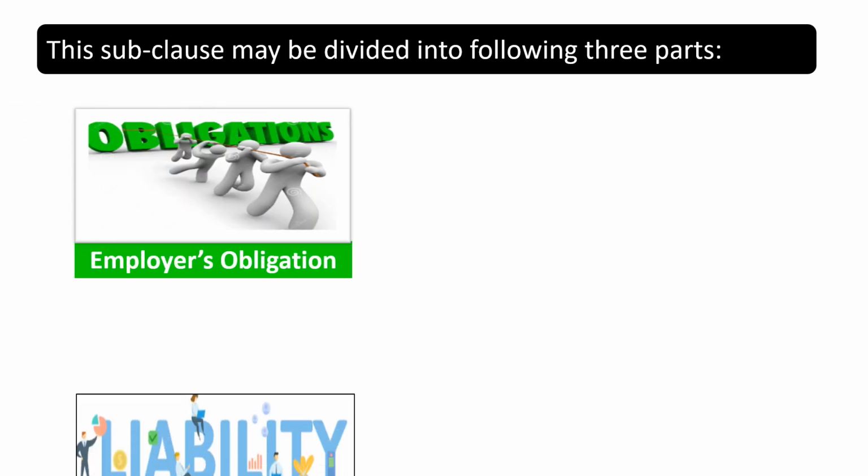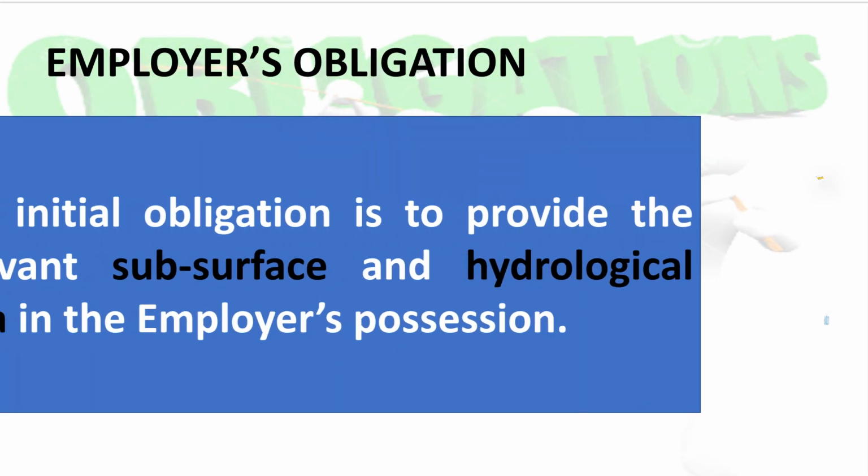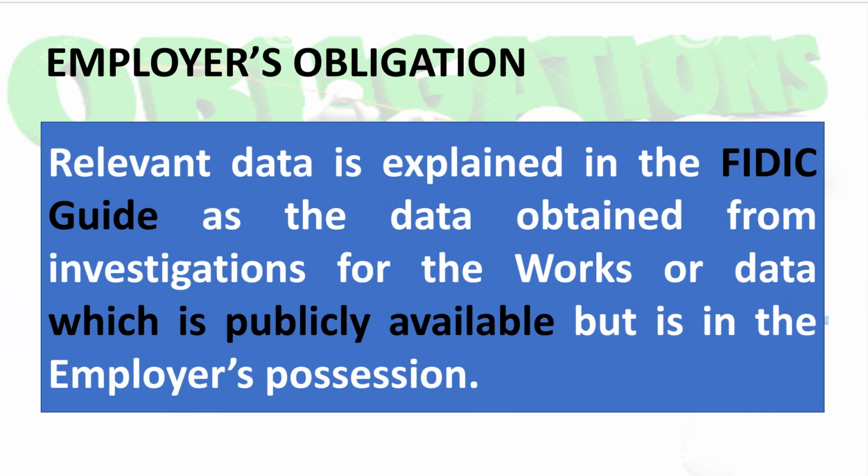So in a nutshell, this subclause may be divided into the following three parts: employer's obligations, employer's liability, and contractor's deemed knowledge. Employer's obligation: the initial obligation is to provide relevant subsurface and hydrological data in the employer's possession.